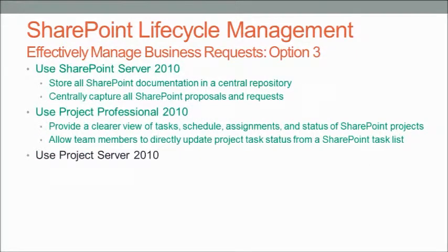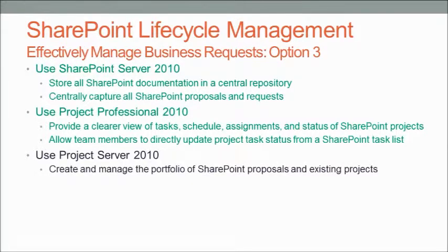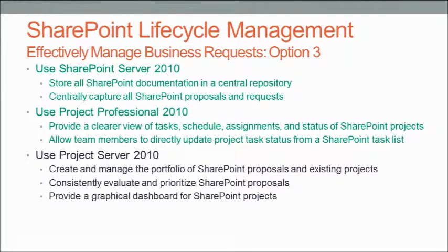And of course, where we'd like you to go, as those of you I'm sure are very mature organizations or even partially mature organizations, is to use Project Server. Now, we're not just tracking things that we've agreed, we're using Project Server as a way of controlling which things that we're going to do. We're going to use the demand management capability of Project Server to take control. And this allows us to decide which of these requests we're going to execute and give ourselves a very good overview of everything that's going on.